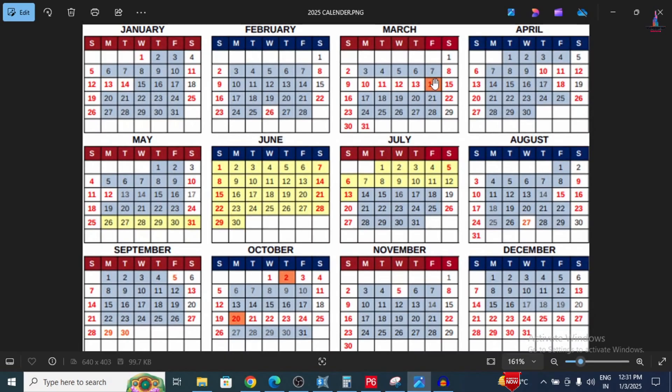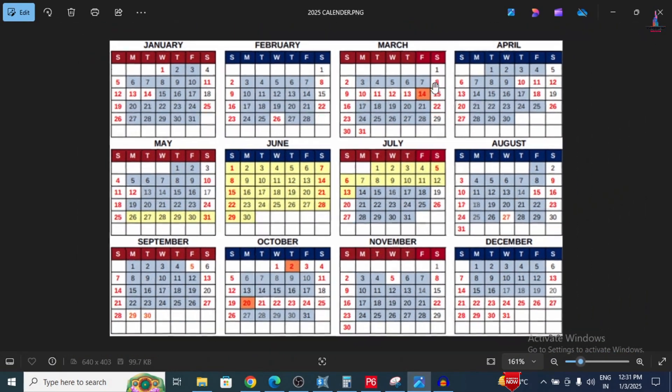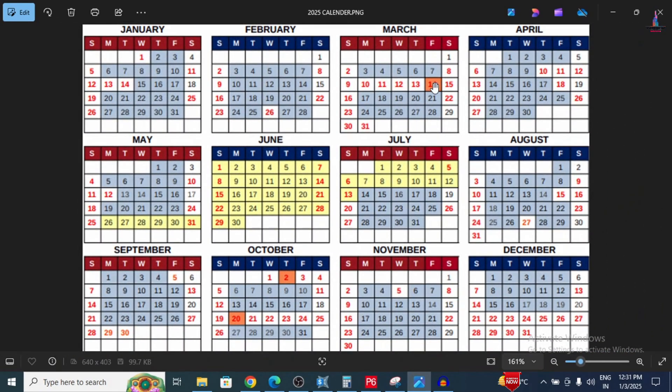This is the process of adding and assigning a calendar for a project using Primavera P6 software. Many people are confused about how to add a calendar. Before adding one, you need to fix the holidays according to your project assumptions. This calendar setup helps you understand the actual project completion duration. If you have any questions, please post them in the comment box below. Thank you.